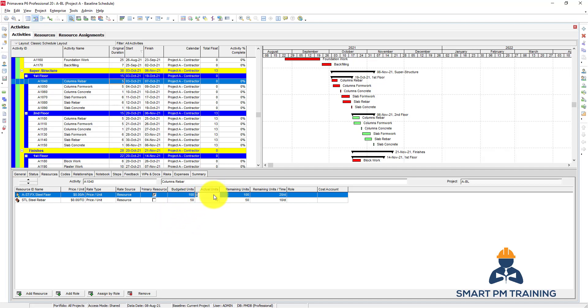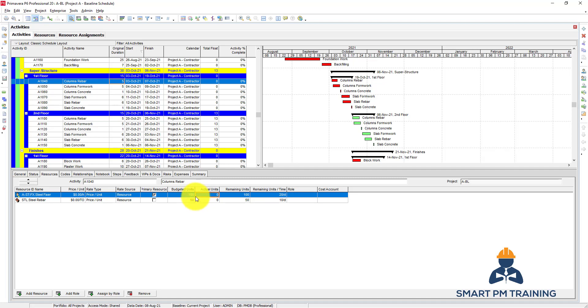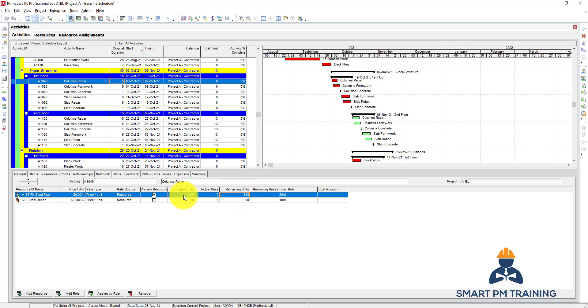Actual units - when we do the update, based on my update, how many units are actually consumed? I allocated 100, but how many labors showed up at work and how many labors are consumed up to this moment when on data date I am updating the program? You can put it here, the remaining units also on your update, but by default in a baseline, the remaining equals the budget because there is no actual - the remaining is the same as planned work or budgeted work.